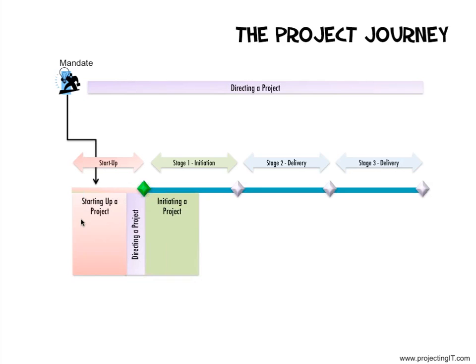During initiating a project, the project manager will identify requirements, will identify teams to do the work, high level efforts, timelines, and budget requirements. The project manager will also determine the risks on the project and what can be done about them. Once initiating a project is completed, the project manager will have a planning document called the Project Initiation Documentation, also called the PID. The PID describes how the project work will be done. The PID describes the business case, the various strategies, and the plan for the project.